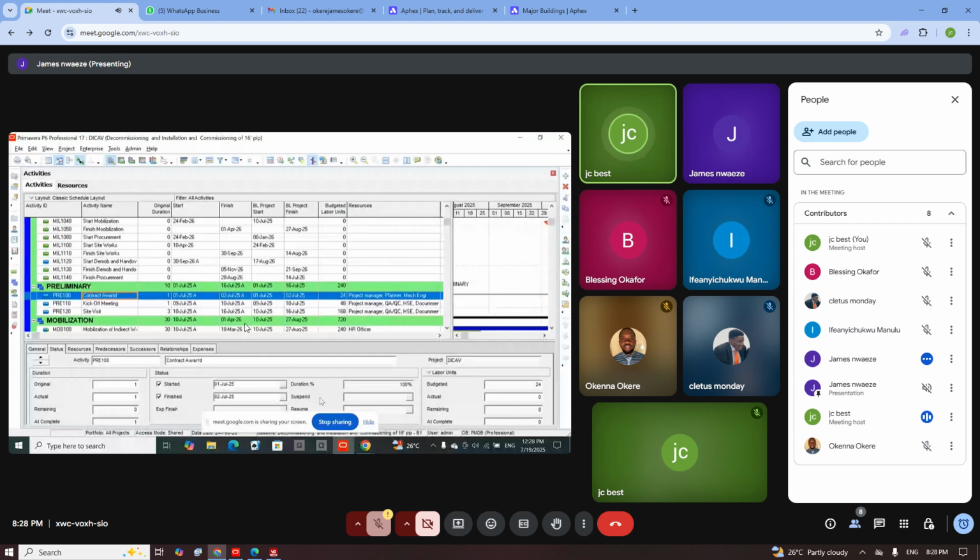So I think let's just try one more thing. Remove all the activities. Baseline it first before you restore the baseline and before you progress it. So remove the baseline, then you put another baseline. You remove the whole progress. So you just do that possibly before the end of the class. We'll revalidate what you have done and we'll reconfirm.